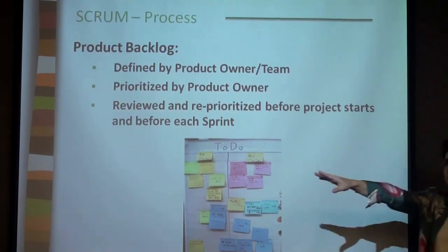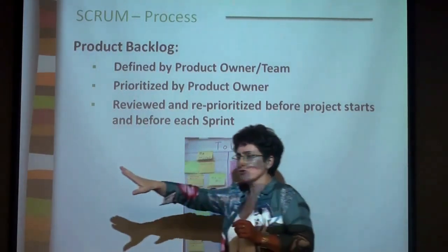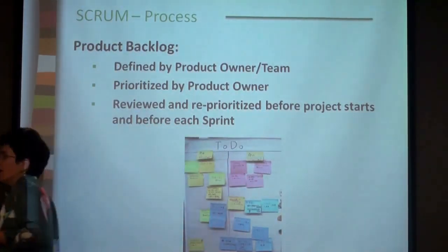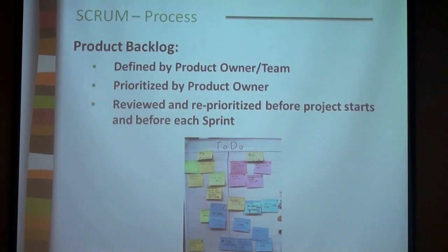And if you look at that wall, you will see those post-its. And I'm using the post-its just because many teams who practice Agile and Scrum do work with post-its, just because it's very easy to change the priorities, right? If you want to change the priorities, let's say the priorities go from left to right. So whatever is the most left has the highest priority. Whatever is the most right has the lowest priority.